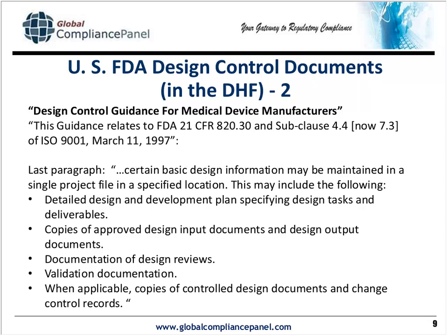Copies of approved design input documents and design output documents, and of course the verification between the two. Documentation of your design reviews, including team members, who the uninvolved third-party reviewer is, time and date, location held. Validation documentation, and we're talking about the overall validation of the entire product, plus maybe some process validation, etc. And again, I'll discuss a little bit more on that later.